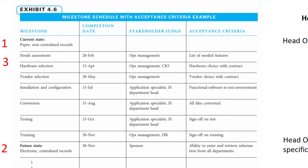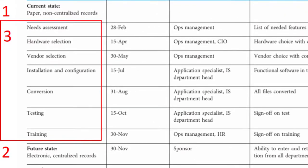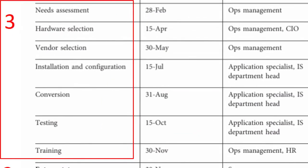Next, determine a few points in the milestone column where quality needs to be verified. This will usually be 3 to 8 points depending on the project, and these should align to the project's deliverables. In the digital records example, the deliverables may be: needs assessment, hardware selection, vendor selection, installation and configuration of the system, conversion of paper-based files to digital, testing the system, and providing training. These would also be the major deliverables.